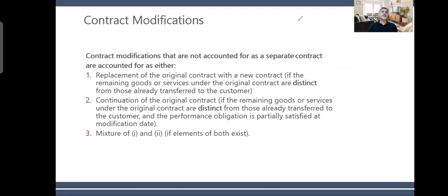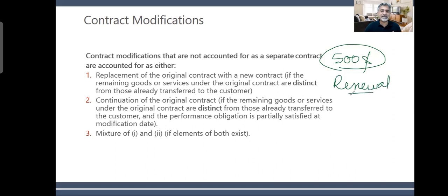It is very important to understand. Don't think you are making a contract for purchasing some small piece of equipment. Believe you me, you have large contracts valuing over $500 million, even more, and these contracts have a huge scope of work. If you make a renewal, it is always easy. It involves less technical, legal and operational hassle. So these are called renewals: same terms and conditions, just renew it on the previously agreed things. Whatever we agreed before, the terms and conditions, the prices and so on, you make a renewal.